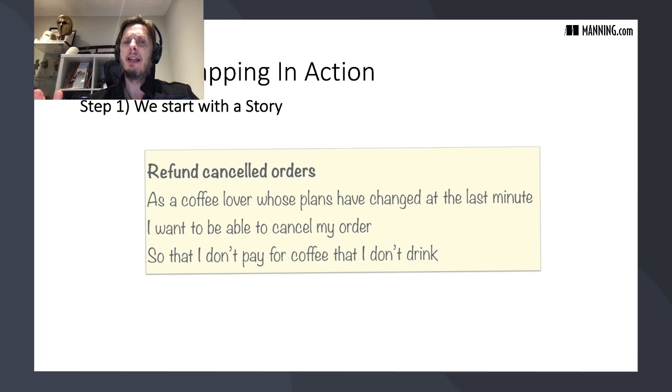A user story can actually be bigger than a user story. Now, what comes into the sprint at this level, we don't actually know the size of it, because this sort of discussion, the Three Amigos, happens before sprint planning. You don't have a clear picture of how big a requirement is until you've talked about it and broken it down into examples and acceptance criteria. Then you can say, okay, this is actually 3 stories, or it's not 1 story, it's 4 stories or whatever. But you don't do that beforehand, you do it afterwards. So that's why I say this is a user story, but it may be a big user story. So I'm going to call it a feature.